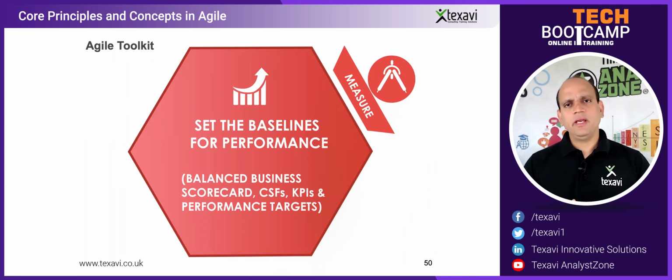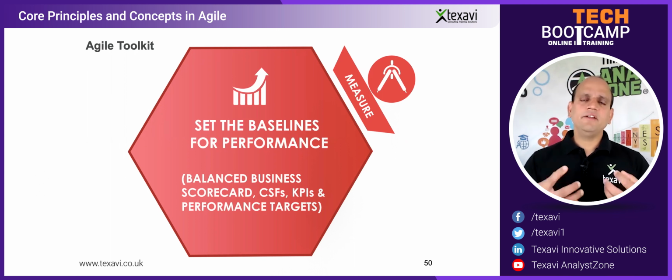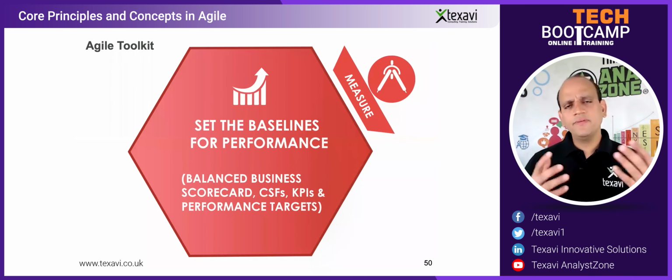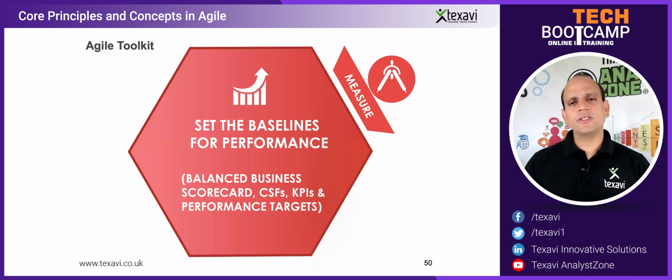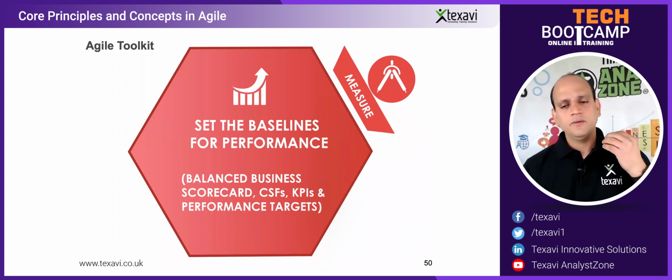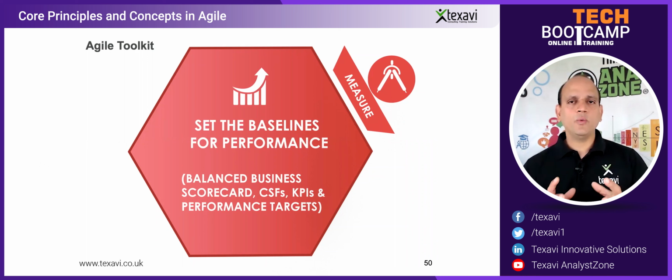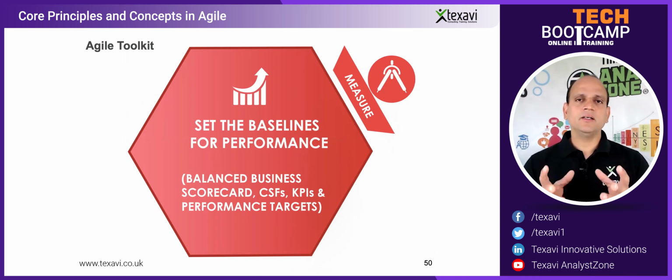That's why we track the capacity and the velocity in an agile context. And then the defects, for example, the number of defects caught in every release, the defect density, the review efficiency. All of these are different metrics that we can use, the productivity. These are the measures that we can keep track of to understand how we're performing as a process, and also the product.